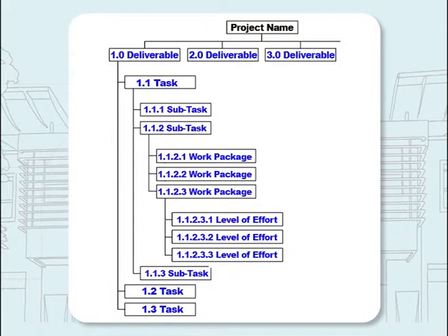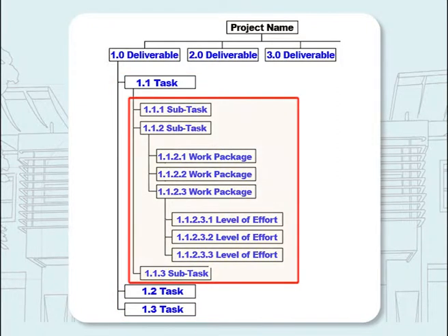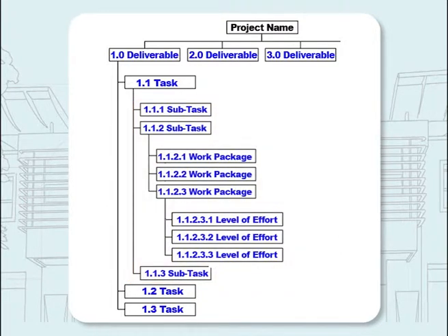As you can see here, the first thing that you need to do is name your project. This is the first level of WBS. Next, you can identify main deliverables of the project as your WBS second level. Once identified, you can move to the third level where you need to break the deliverables down further into tasks. Please take note that you may break your third level tasks down into fourth level subtasks if required. Here is an example of WBS based on what we have discussed just now.